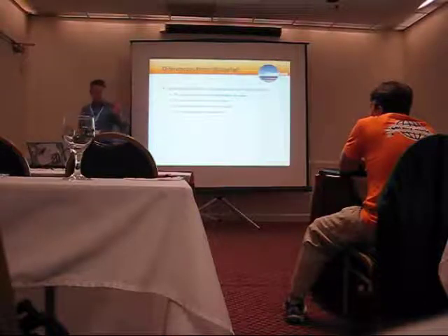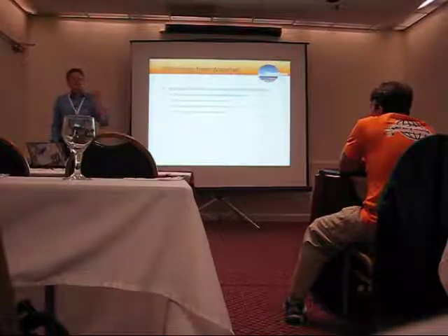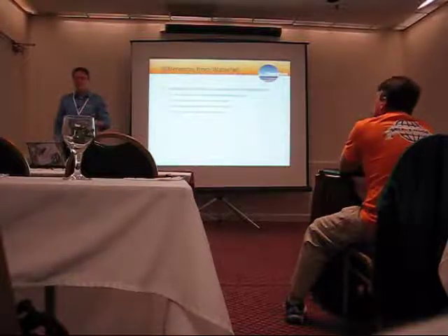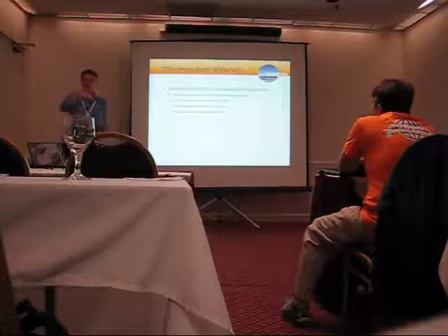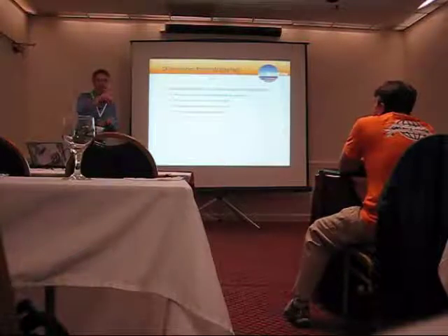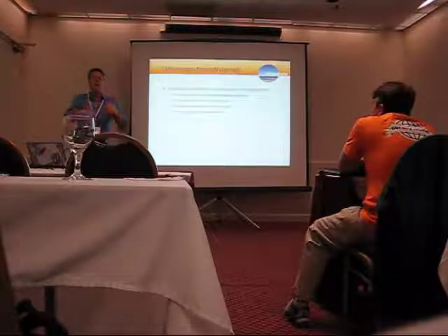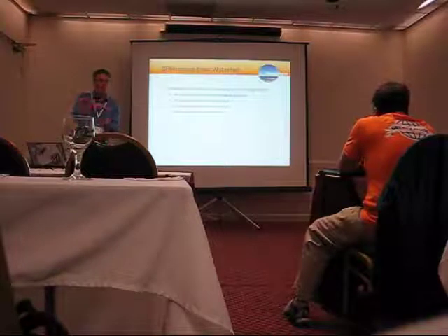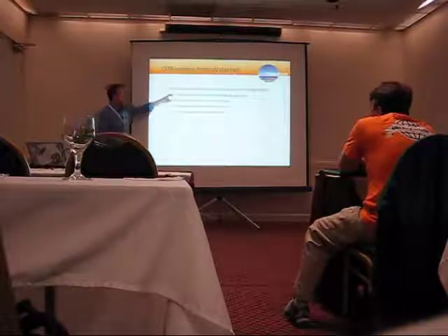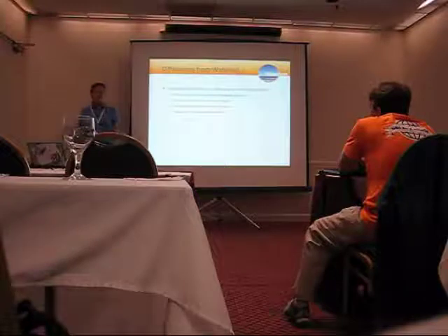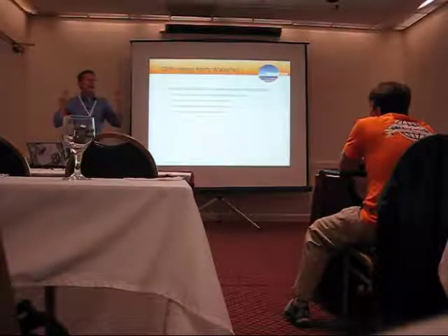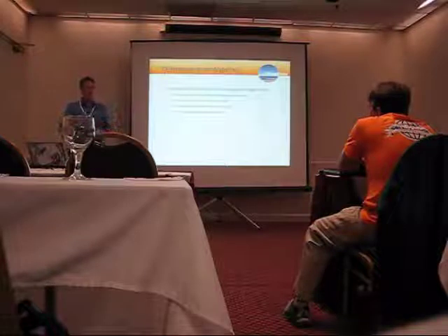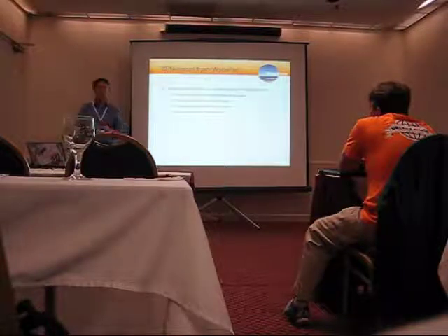Now, I will also say that traditional project management does understand the concept of progressive elaboration, where you plan as much as you can, and then when you get into the execution and monitoring and controlling phase, sometimes you blow out some more details because you learn as you go, and that's fine, but you still plan everything up front. All work has to conform to the plan. If it's not the plan, it is called gold plating. It is out of scope. We don't do anything that's not the plan. Even if it's a great idea, we're not going to do it.